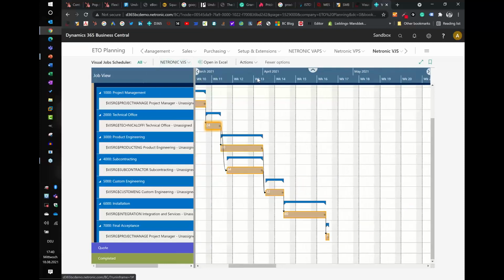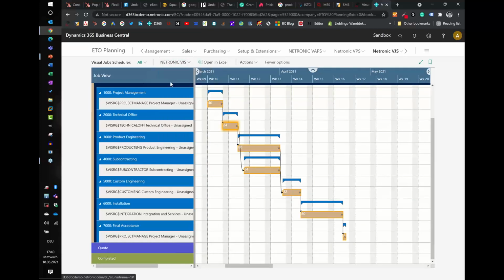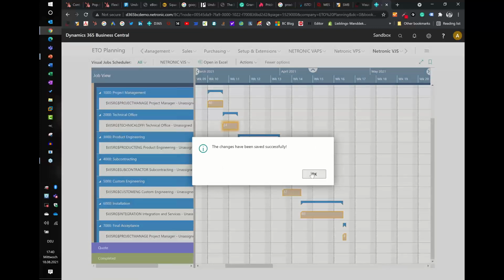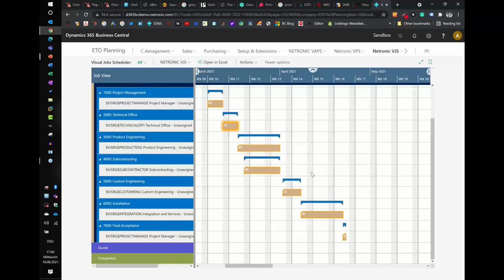And now my project is set up, so time to save this. And then next time I open up the template, I have this defined as it is. So this time scheduling, this scheduled successors, like cleaning the sequence of the tasks up, this was actually the 8th step for effective ETO project management. And now, as the template is set up, we can actually create a job, a new project from that template, and then schedule that project.